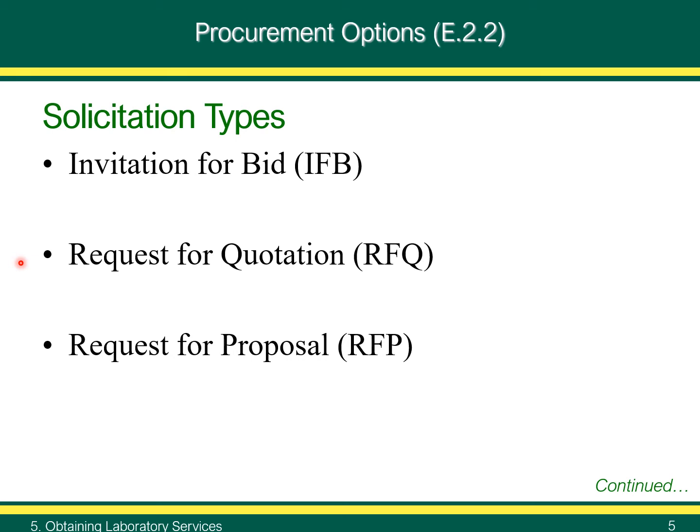The maximum estimated price cannot exceed the Simplified Acquisition Threshold, or SAT, of $250,000. There is a set-aside for small businesses when two or more small businesses are available that can provide the services. Although the competitive bid process is primarily based on cost, it may rely on best value as well.